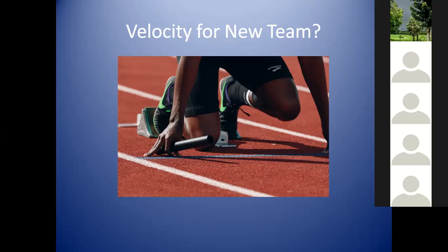Yeah, but somewhere you need to start, right? You cannot say that I don't know what my team's outcome will be at all. So somewhere you need to start. Even though the nature of the story is different, the reason we always say average velocity should be taken after a certain period is because your team needs some settling time. Your team may not be able to deliver the way they will when they have the complete information. There are a lot of dependencies which you have not identified because you are not so clear about the requirement. All those things will be happening, and your product backlog also is still getting refined.